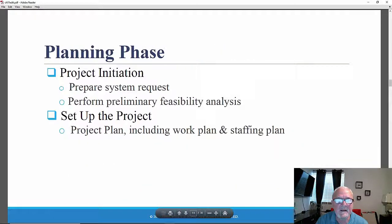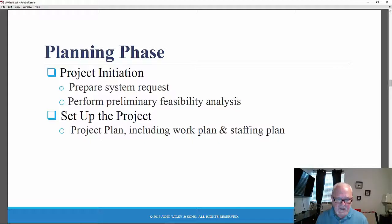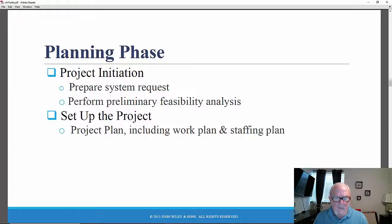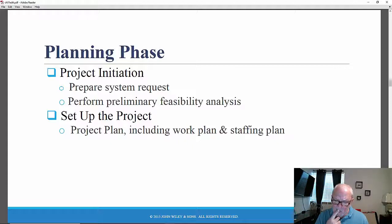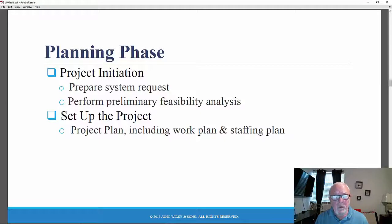Let's begin by discussing the planning phase. The planning phase is the first phase, and that's where the project is initiated. How will the system contribute to the organization's future success? There may be prepared a system request and some sort of feasibility analysis that examines key aspects of the proposed project. Technical feasibility — that is, can we build it? And economic feasibility — will the system, when implemented, actually provide some sort of return on investment, some sort of business value that will be returned to the company?